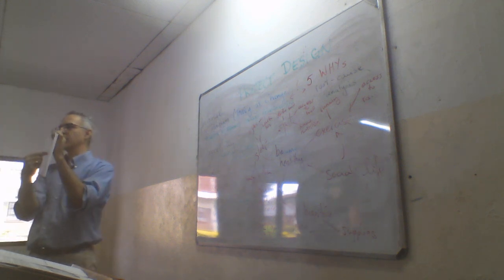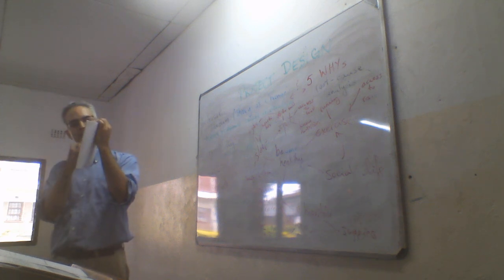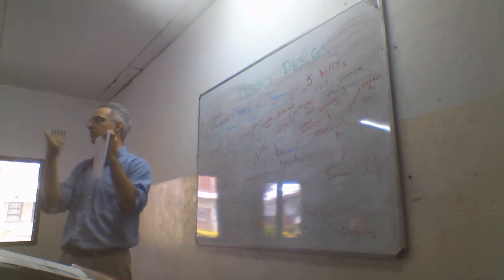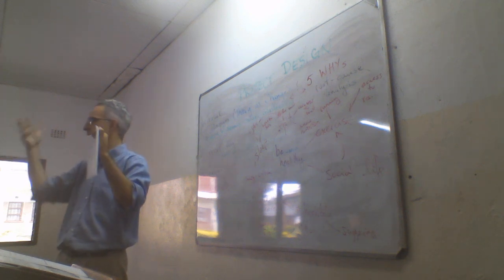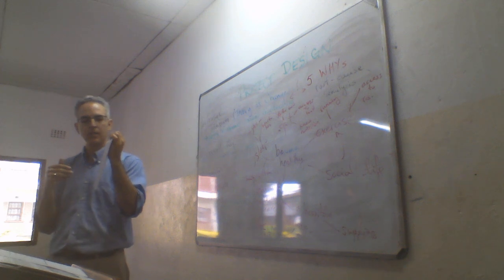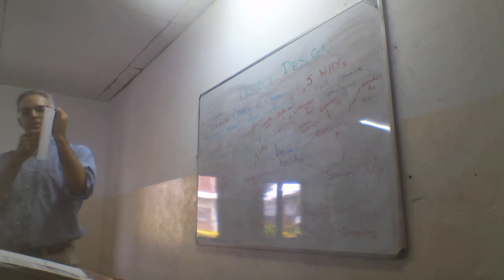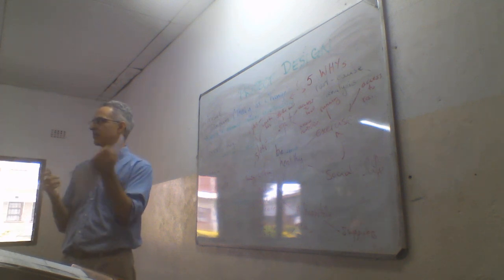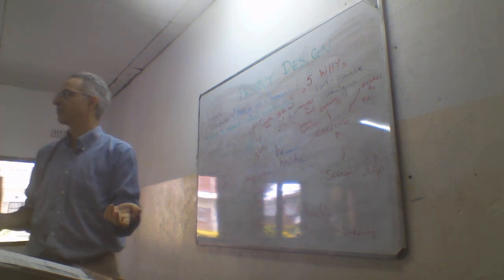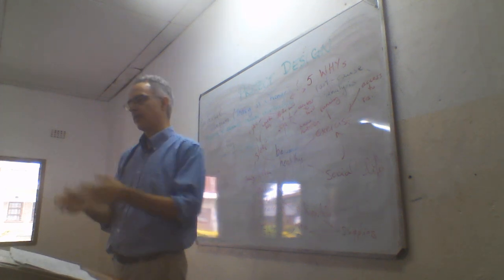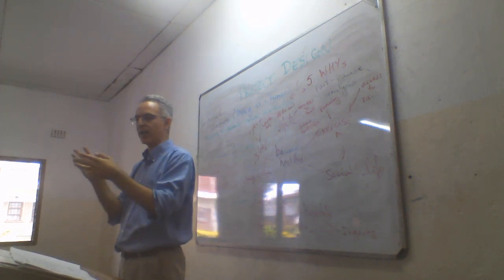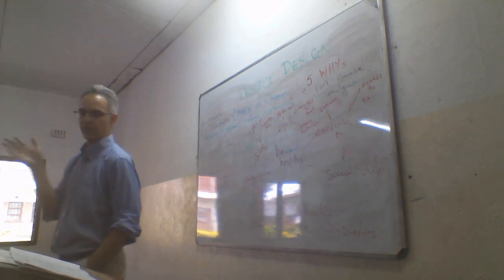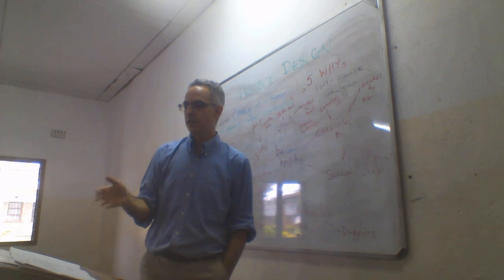Now, for every one of these activities, there are even inputs before that. So in order to carry out these activities, you need people, money, resources, equipment. For each of these, you can create indicators. An indicator is a thing you measure, right? Impacts are harder to have as indicators. But the other ones, you can.